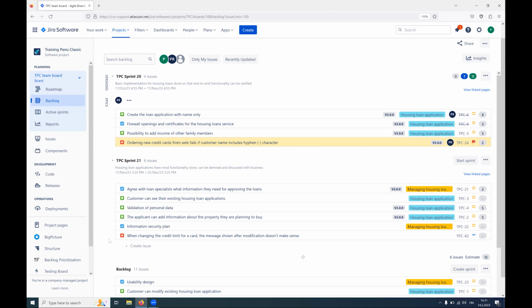If we know that we have 30 points, don't put 30 points there, because it's quite certain that there will be some changes. So be flexible also if you are planning those futures. They're more like placeholders. Yeah.